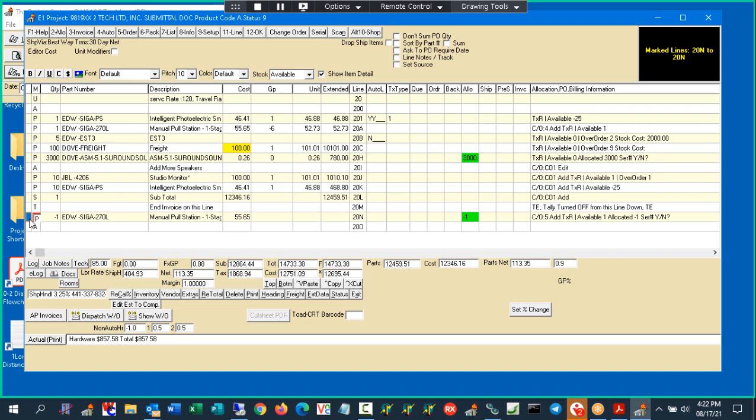So can everybody here. So you're right, but if you lock it, they can still add to it. Lock means you can still add. That's correct. Yes. You just can't edit. Correct. Unless there is a backdoor to that too. If you have the security point to allow you to unlock a line, you can unlock the line. There is a security point for locking an individual line, and then there's a security point for unlocking the entire project. But then you lose the trail. They may not care about that, but the point is it's there.